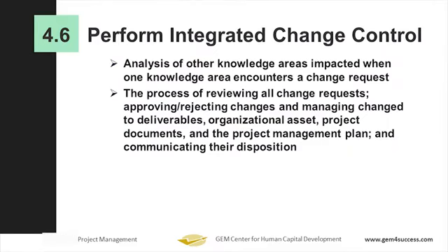You don't just take that problem to solve. You are expected to sit down and do an analysis of the impact of that change on the project. First of all, do your analysis of the impact of the change on the project. It is that report that you now take to the change control board or your sponsor.